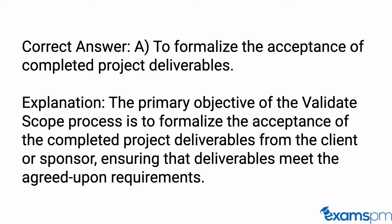Correct answer: A. To formalize the acceptance of completed project deliverables. Explanation: The primary objective of the validate scope process is to formalize the acceptance of the completed project deliverables from the client or sponsor, ensuring that deliverables meet the agreed upon requirements.